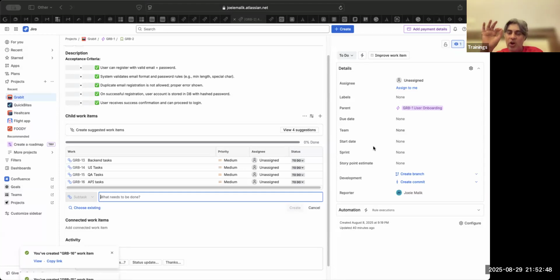And this is the core, the heart of this process, that discussion happens so that clarity emerges out of that requirement. What are we going to do? What are we going to build? What are we going to test? The details, how many APIs? Some say, no, no, 1 API is not enough, we need 2 APIs. The other person says, no, only 1 API is there. Imagine we needed 2 APIs here instead of 1, and the team discovered this problem after the 4th day. So better you talk it out now. That is the whole purpose, that you have a discussion.